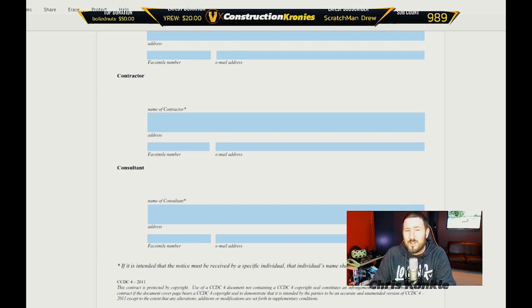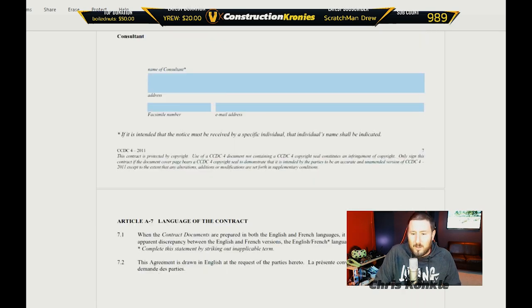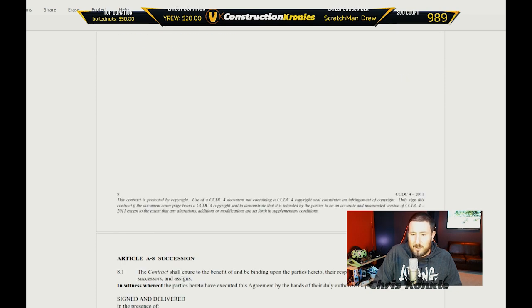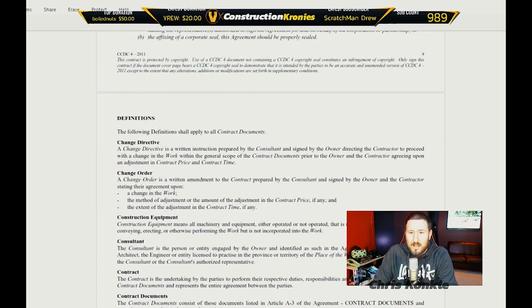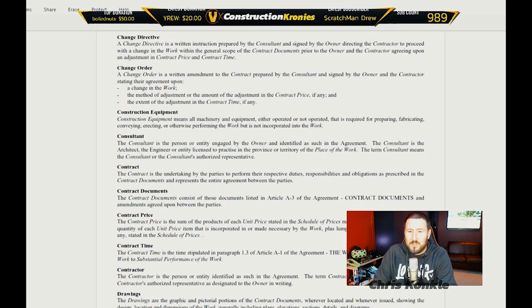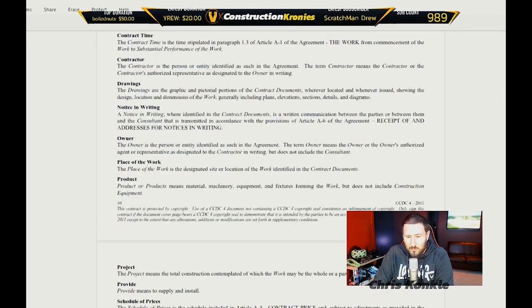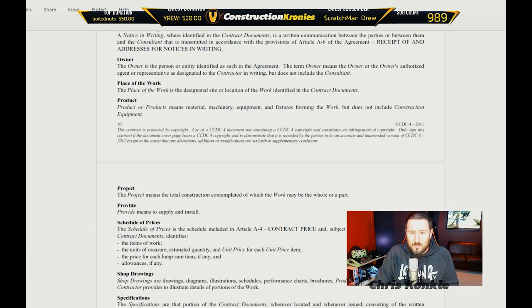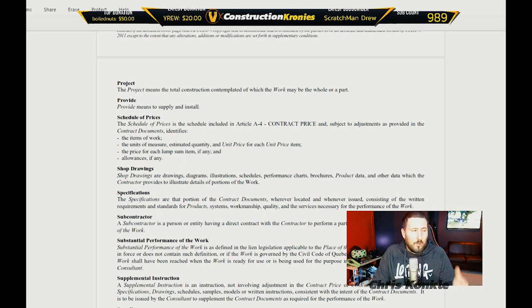I have a set of general conditions you can download off my website right now at ckflogs.com — a full list of general conditions that you can use as a contract itself. The contract covers language, succession, signatures, and definitions. Things like change directive, change order, construction equipment, consultant, contract price, and so on. The most important ones are the ones that you don't necessarily know but would want to know — things like what they consider substantial performance, not substantial completion, because your payment is very important.